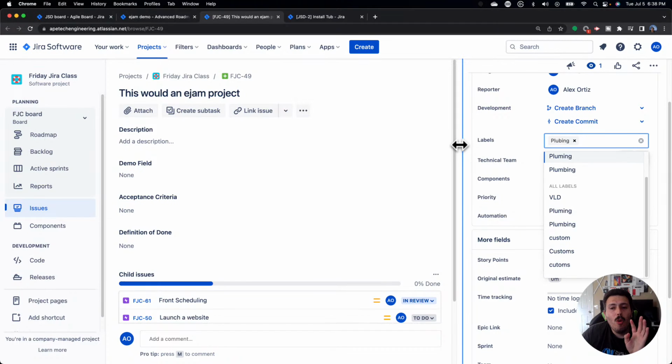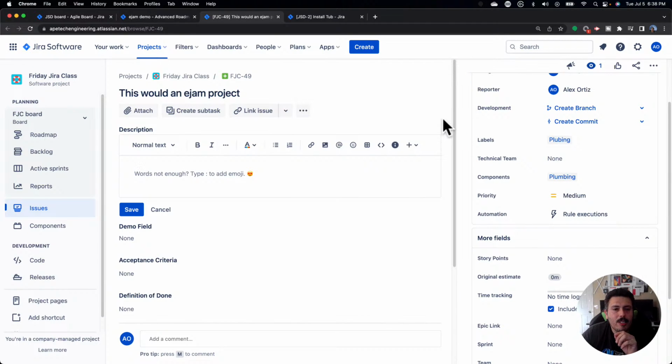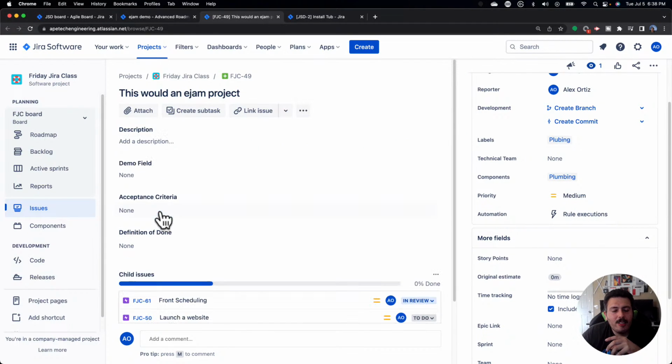The way number 4 that I would recommend you take care of this is, if you have access to adding custom fields, I would add a custom field that is called like project/initiative, and then call them out there. The problem there is, because these are custom fields, anytime you add a new initiative, you're going to have to basically add a new value to that field. So those are the 4 ways that I would do it if you don't want to basically double the price.